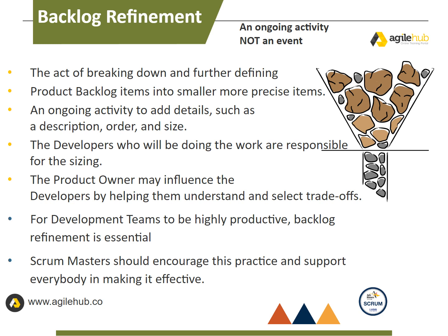Backlog refinement. The act of breaking down and further defining product backlog items into smaller, more precise items. An ongoing activity to add details, such as a description, order, and size. The developers who will be doing the work are responsible for the sizing. The product owner may influence the developers by helping them understand and select trade-offs.